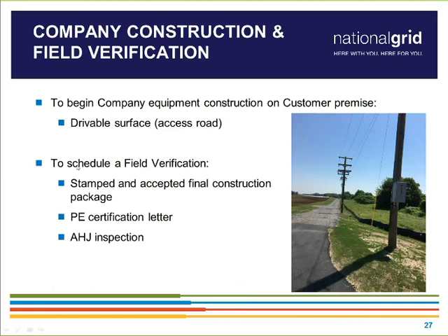And then for the field verification stage, we need to get into and see the stamped and accepted final construction package, really what Chris just went through, a PE certification letter, which is really just the engineer certifying that the installation's been installed per the approved design, and then also the inspection from the local authority having jurisdiction.